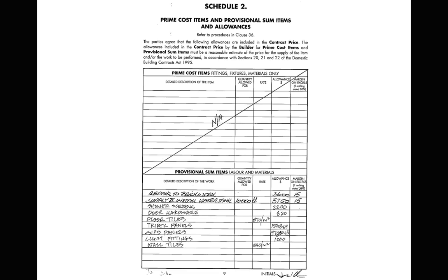And I think I mentioned last week that smaller builders tend to load up the front more because they don't want to pass on the cost of running an overdraft to not have the money to do the project in the beginning. So what you can see here is in the actual contract itself, and I'll load all this stuff up onto the canvas.